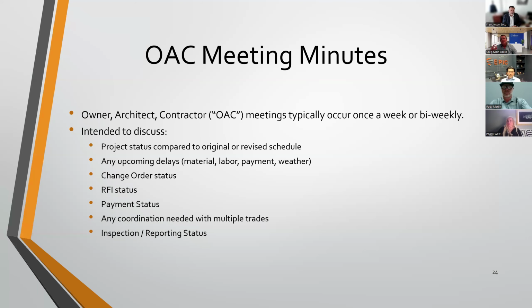And typically, with most condo associations, if your owner rep is doing a good enough job, those meeting minutes will roll up to an executive summary that will be compiled on a monthly basis and uploaded to your portal for transparency amongst the board and the residents, keeping everyone on track.